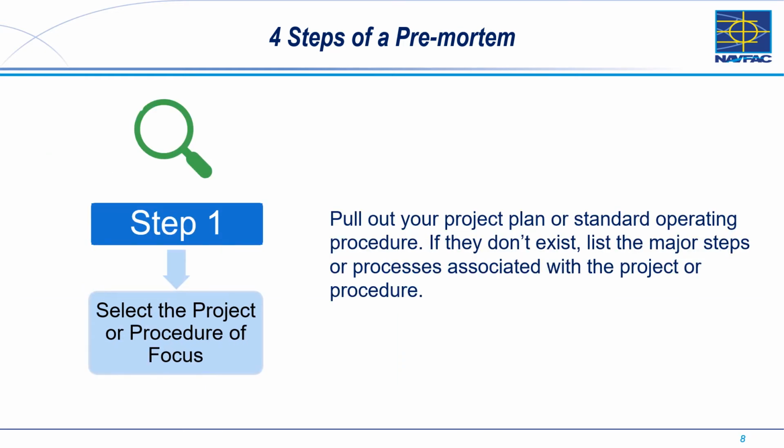The first step of the pre-mortem process is to select the project or procedure you want to conduct a pre-mortem on. Pull out your project plan or a standard operating procedure. If they don't exist, list out the major steps or processes associated with the project or procedure.